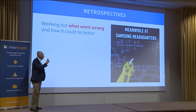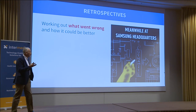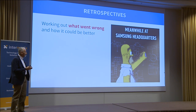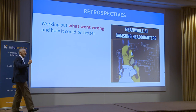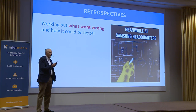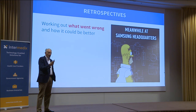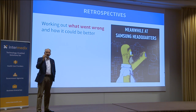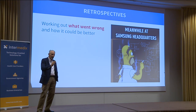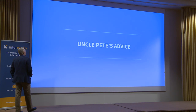Retrospectives — this is where you work out what went wrong. You go through the process and decide, 'oh, that was a mistake.' They're very good. You should schedule time as part of the sprint to do a review. It costs a little bit of time to make sure you're not continuing to be silly.